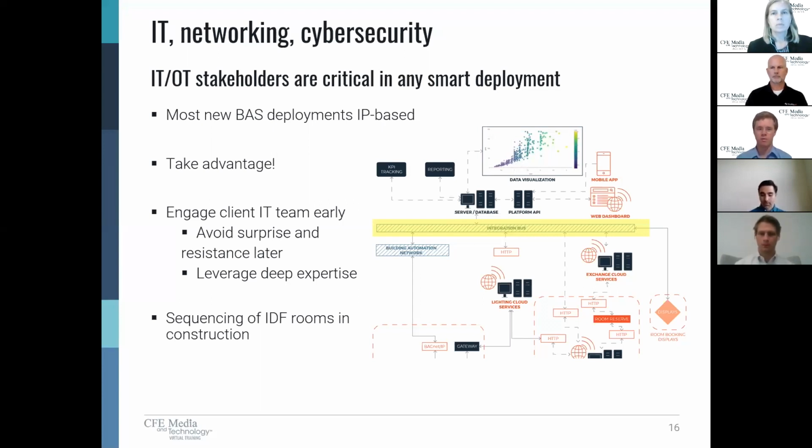Some IT rooms, 20 years ago, say, kind of ended up on the back end of a construction schedule, but now, as a critical point in the middle of the system, as the graphic depicts, they're a pinch point. So it's just construction sequencing, and sometimes it takes a little education of some general contractors on when that needs to happen. Of course, we're all in this together, and in our recent experience, we're starting to work with more contractors who completely understand that. They're also getting ahead of that virtual need, if you will.